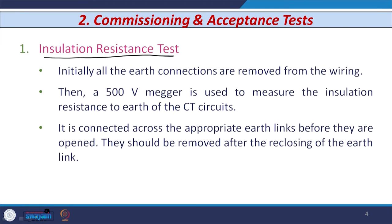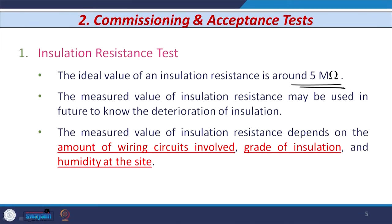The first test is known as the insulation resistance test. Initially, all the earth connections are removed from the wiring, then using a Megger of 500 volts or 1000 volts, the insulation resistance is measured relative to the earth of the current transformer circuit. The ideal value of the insulation resistance is around 5 mega ohm. The measured value can be used in the future to track deterioration, since after 2 or 4 or 6 years, this value may change.